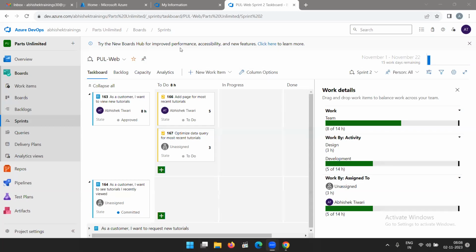So yesterday we were managing the work items. Okay. So here we have seen how to create an epic, then how to create a feature, and inside the feature, how to create backlog items. Backlog items are nothing but what we call in agile the user story. So whatever you call a user story, here it's a backlog item in the Scrum process. So these are user stories.